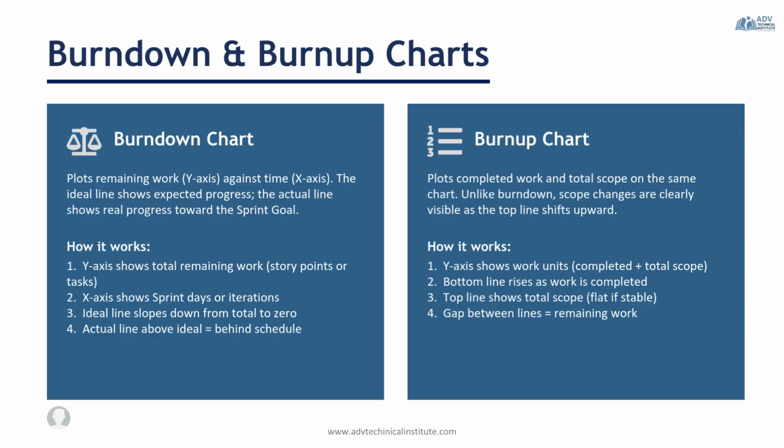On the other hand, you have the burn up chart. That addresses this limitation by displaying two lines, one for the total scope and one for the completed work. If new work is added, the scope line increases, while the completed work line continues to rise. The gap between the two lines represents the remaining work.